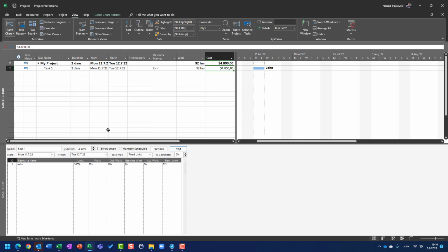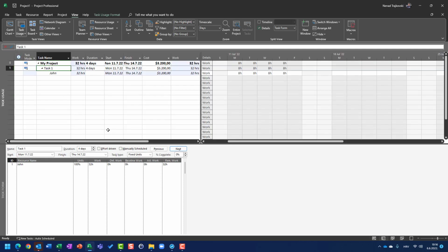And in total here, you will see that we have $4,800. Now, last but not least, let me go back here to the starting position. What if I say, okay, John is supposed to work on task 1 for 4 days, 32 hours, but I don't like it. He should work 48 hours. So if you see my intention, I want to increase the total work and put the overtime work as well. 32 hours are not enough, so I will put 16 hours more. So he is going to work 48 hours, but these 16 more hours are going to be overtime.